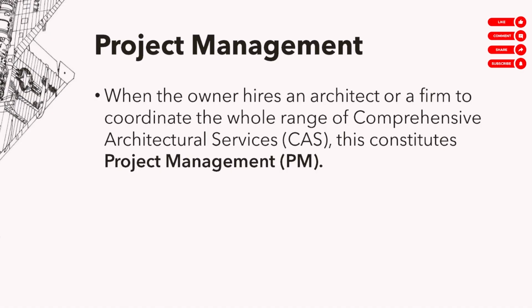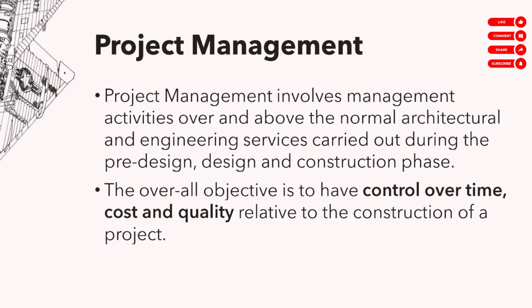Now, that's the essential difference between a PM and a CM. Ang scope ng CM, obviously, construction manager is the construction phase down, whereas the PM is involved and oversees all phases from pre-design services kung meron kinuha to the regular design service, specialized services kung meron, and then construction service and post-construction services. So the entire parang the 5 groupings of services, the PM manages or oversees all of those 5. Kaya mas broad yung scope ng project management.